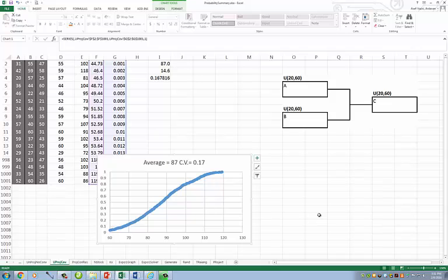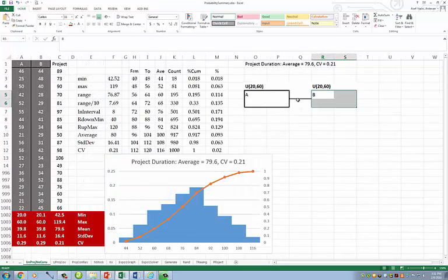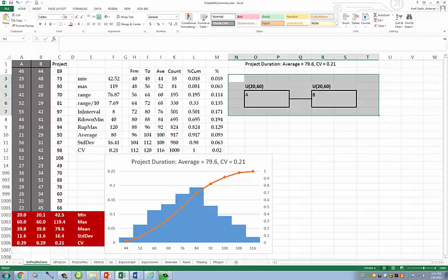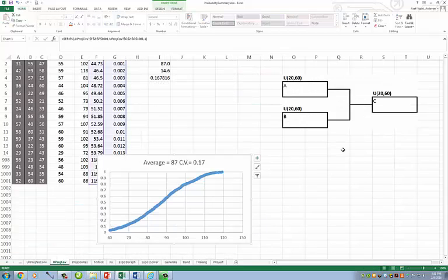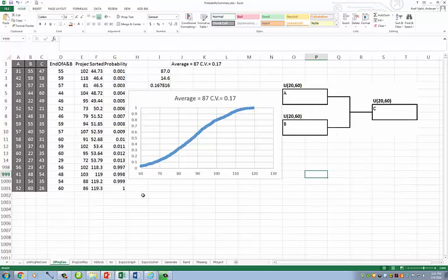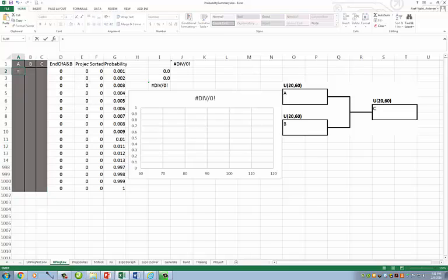So we are going to compare these two projects and show that while in a deterministic world, the duration of both projects should be 80 days, in the real world, this number is not. So I'll come here, equal to 20 plus 20 minus 60, which is 40, the difference between upper and lower limits, multiplied by RAND.